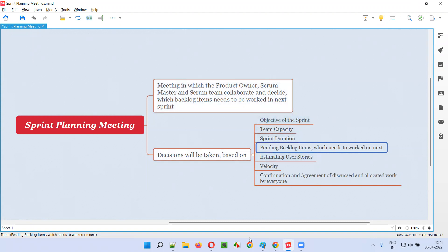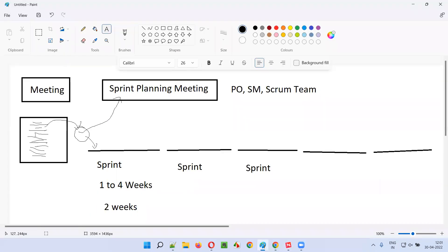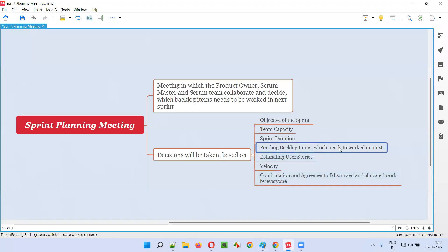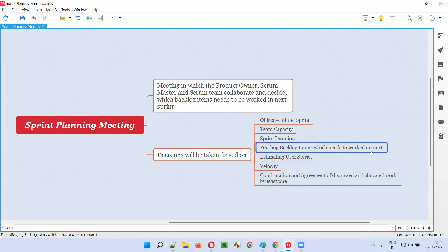Another factor is pending backlog items - how much work is pending. Based on priority, they decide which work needs to be done next. These are user stories in the product backlog that need to be worked on next. They also estimate those user stories using story points - giving estimates on the proposed stories before the meeting or during it.